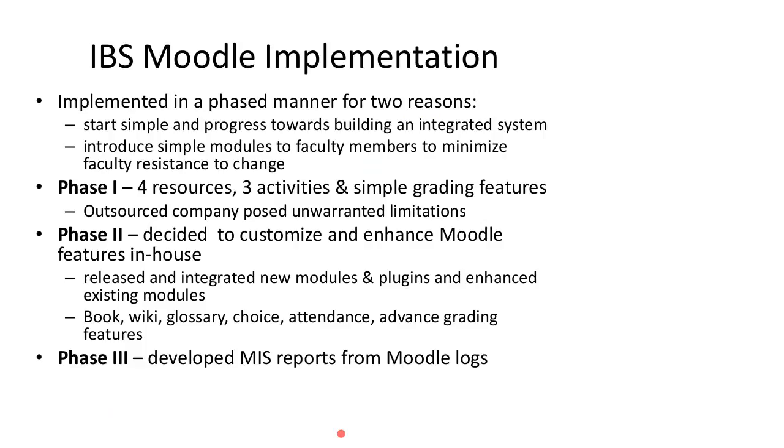So we implemented Moodle in a phased manner. This is done for two reasons: start simple and progress towards building an integrated system, and to introduce simple modules to faculty members. This helped us to minimize resistance from our faculty members.